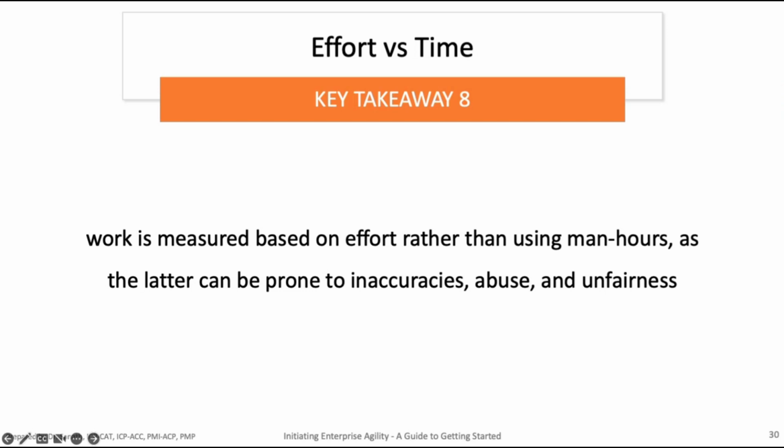And if I can then say that we're going to do 20 points of work, and that 20 points of work, we will decide how long it takes. But we will finish 20 points of work. Now, typically in Agile teams, they decide this ahead of time, right? And if you have a sprint, the team decides how much work.